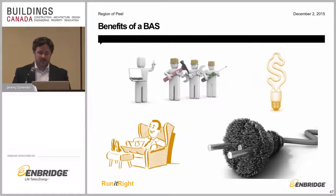We also do BAS to save money. It's not just energy conservation. We have found some good results, especially if training happens. We've also seen negative results, as Stephen pointed out, where if training did not occur, we've seen spikes in energy usage because people didn't commission it correctly. The default settings were put on, and the building was actually operating more poorly than it was prior, so we'd have to address that. We have addressed those kinds of issues, but it can happen. The other piece, and I'll discuss this in a coming slide, is scheduling, which allows for shifting energy use and taking advantage of energy rates and things like that. And we have installed, in some of our more sophisticated systems, triggers that are based on rates.